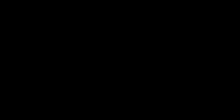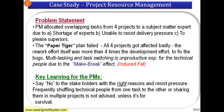What happens is when you have multiple different tasks from different projects given to a single person, it is very difficult to switch — it is very difficult for a technical person to switch tasks. You have to make and break operations repeatedly. A lot of break-make operations have to be done, and this actually affects the productivity of a technical person. Managers can do multiple tasks because their team members are doing the actual work, so they can multitask — but for a technical team member it is extremely difficult to switch between different tasks.